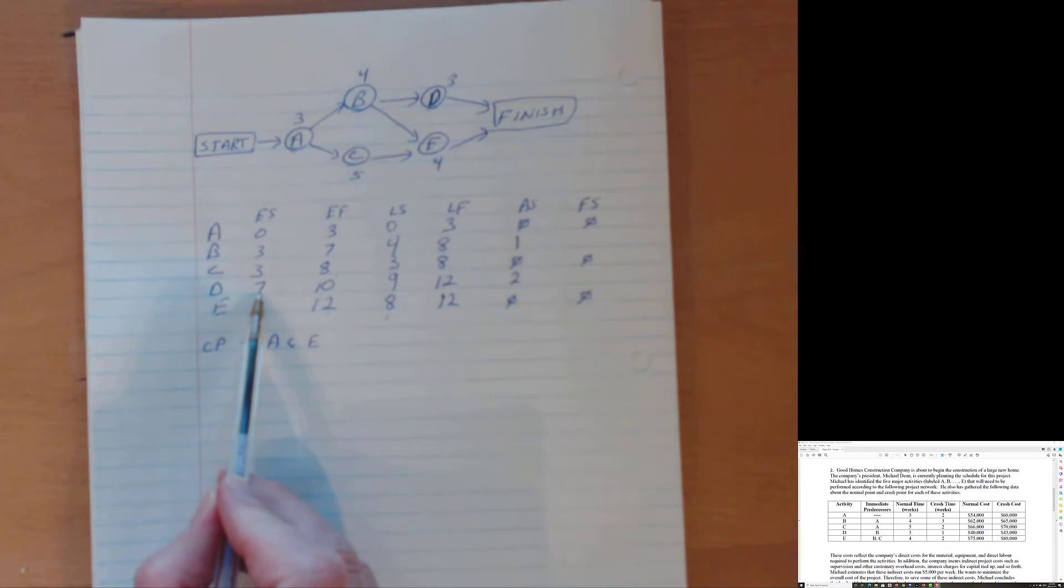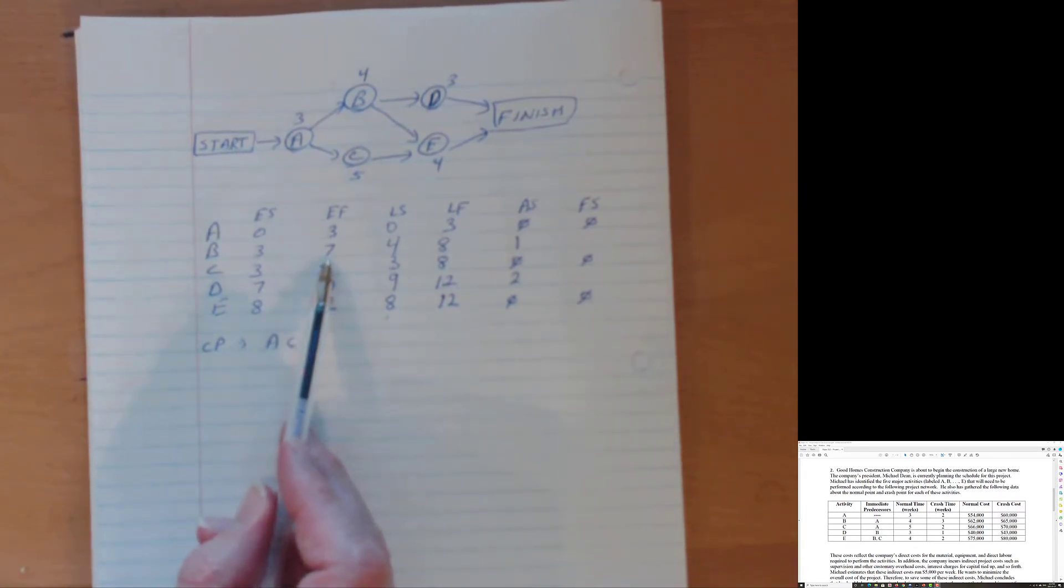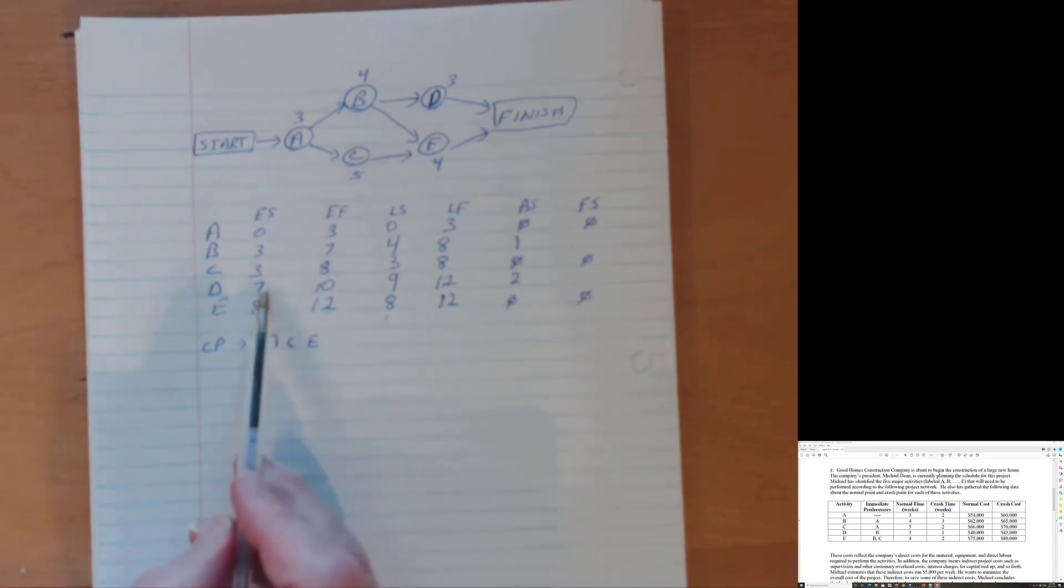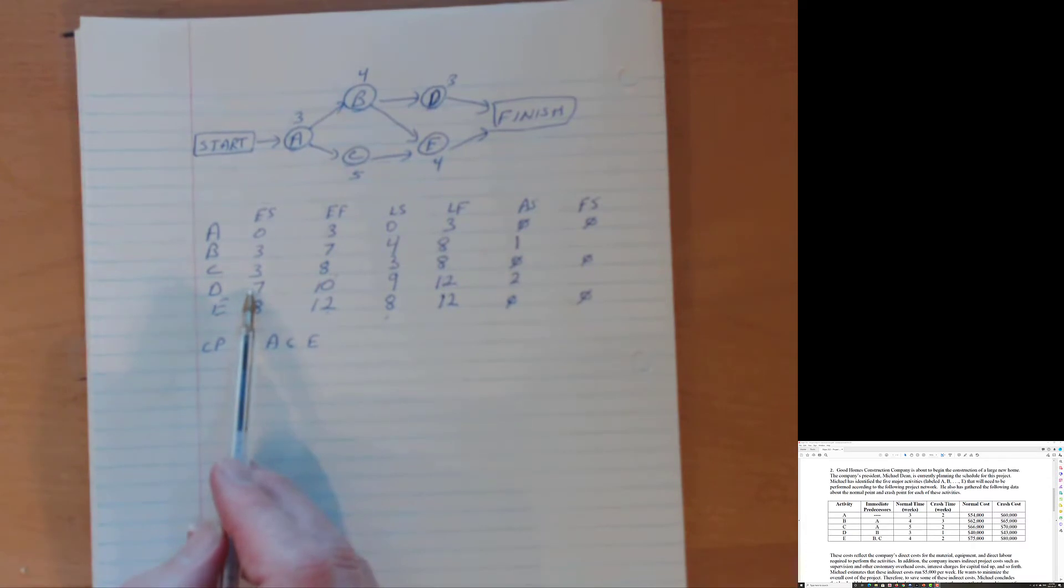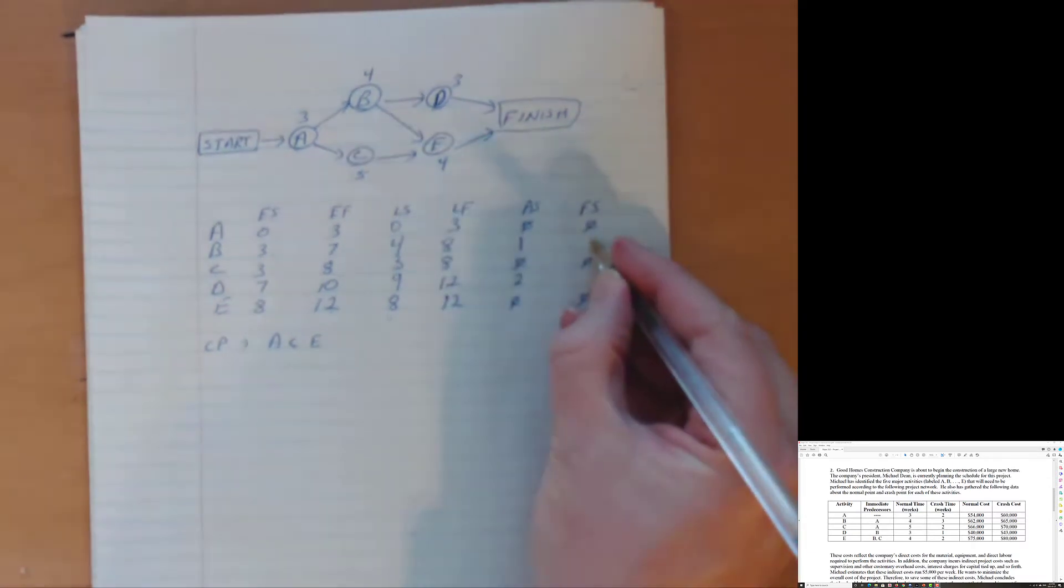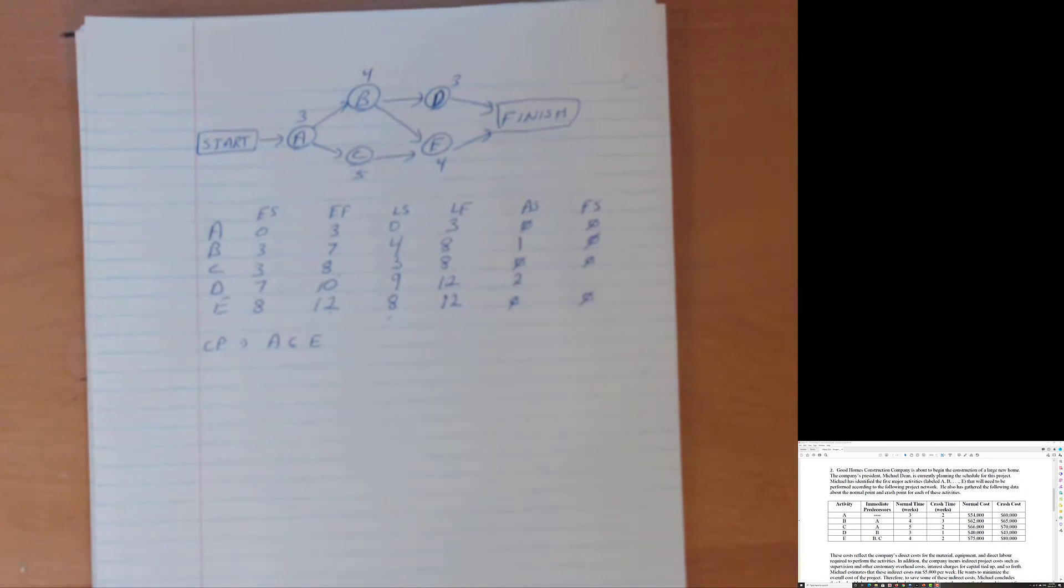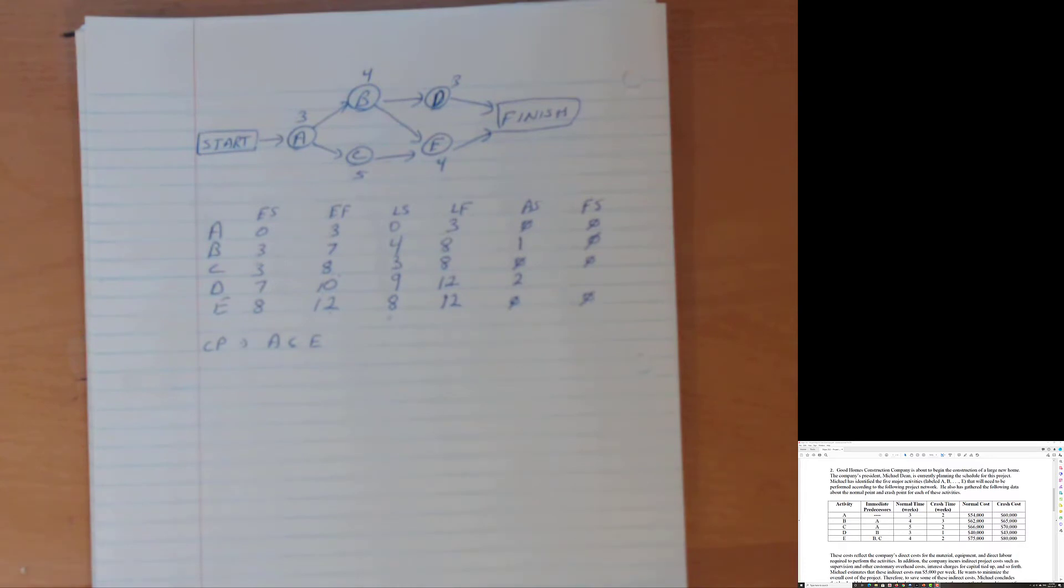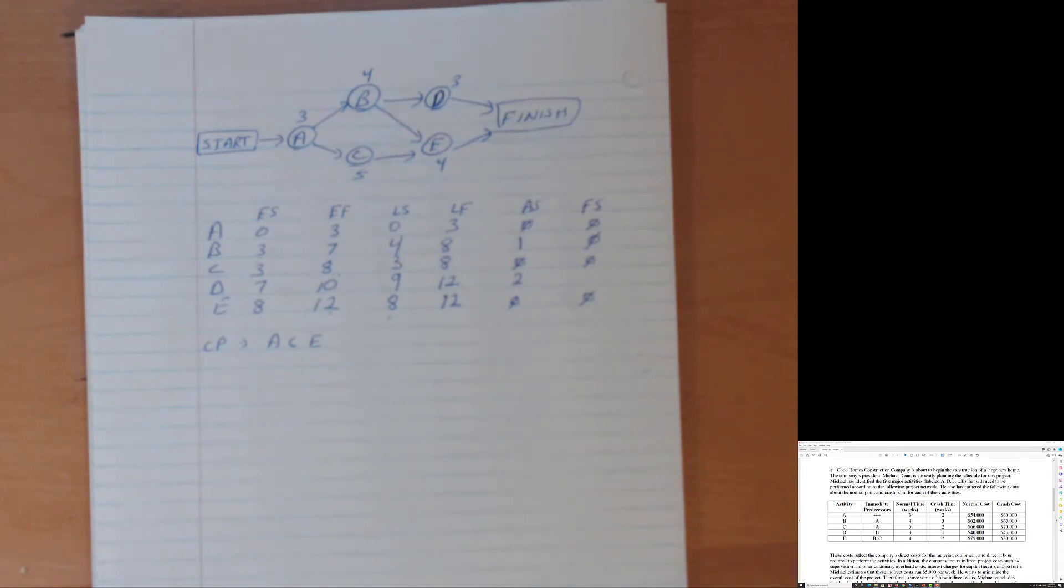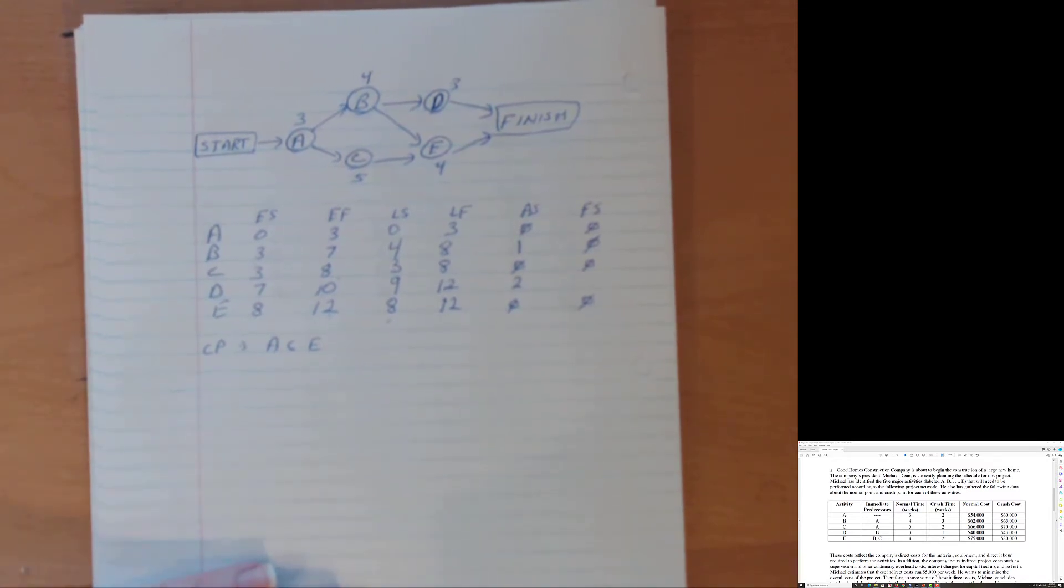What's the earliest finish for B? When is B normally going to be finished? Well, week seven. So that's telling us that any delays in B was going to delay D. And so no free slack there. We kind of also can kind of cheat a little bit or use it. Cheat's too strong a word. Use a shortcut, an efficiency tool. D is not on the critical path. So with D not being on the critical path, kind of can suspect that it's free slack and activity slack will not be the same. Because B just goes straight to D.